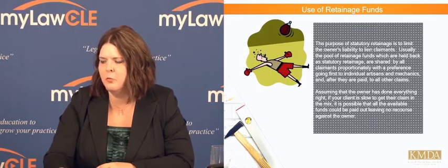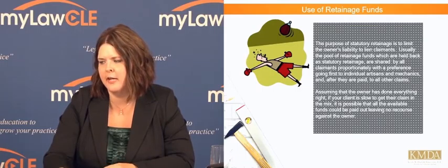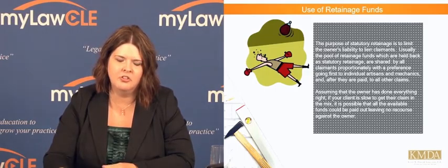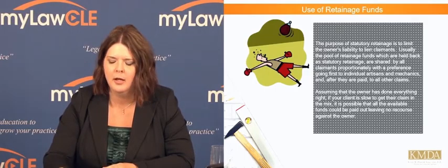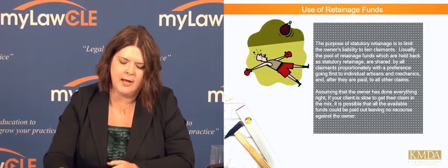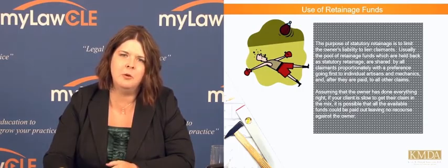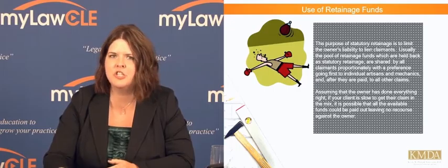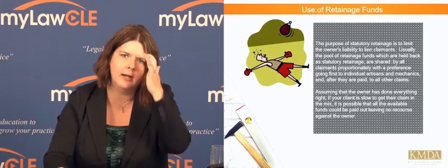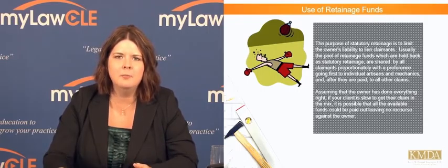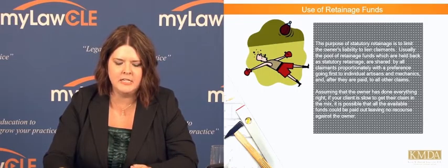So just what is the purpose of retainage funds in general? I've given you the bad side of what retainage is for maybe your client, but what is it supposed to be used for? The purpose is to limit the owner's liability to lien claimants. That was the reason they originally came up with the process. They wanted the owners to not have unlimited lien claims against them that they had to pay.